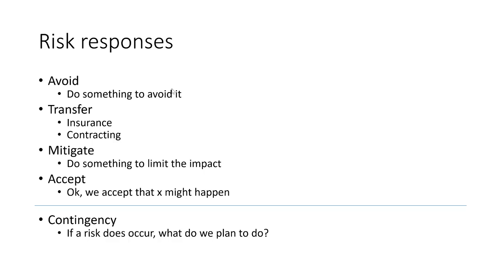And a contingency is what happens after a risk happens, right? So we make plans to go, you know what, if something does happen, then we'll do this. So the contingency plan for running out of gas on the way to the concert would be either to use the gas in the trunk that we had in the gas can, or call the AAA guy, or call your buddy who might be able to pick you up and take you there, right?